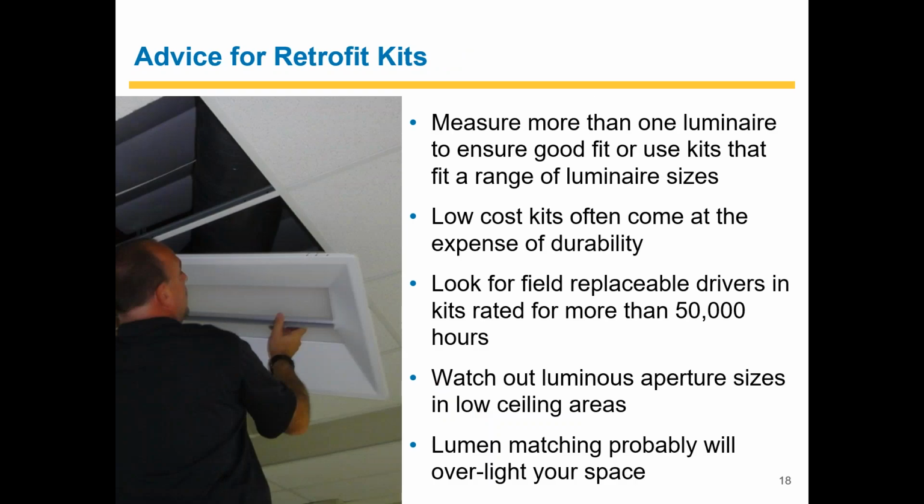So when you're doing retrofit kits, things that I like to keep in mind is measuring your luminaires. Luminaires are going to have some differences in dimensions, and even if they look the same from the floor, inside that fixture they could be from different manufacturers with slightly different measurements. I've been burned on a few projects where you didn't do that, and so now it's in my standard operating practice. Generally speaking, low-cost kits will come at the cost of durability.